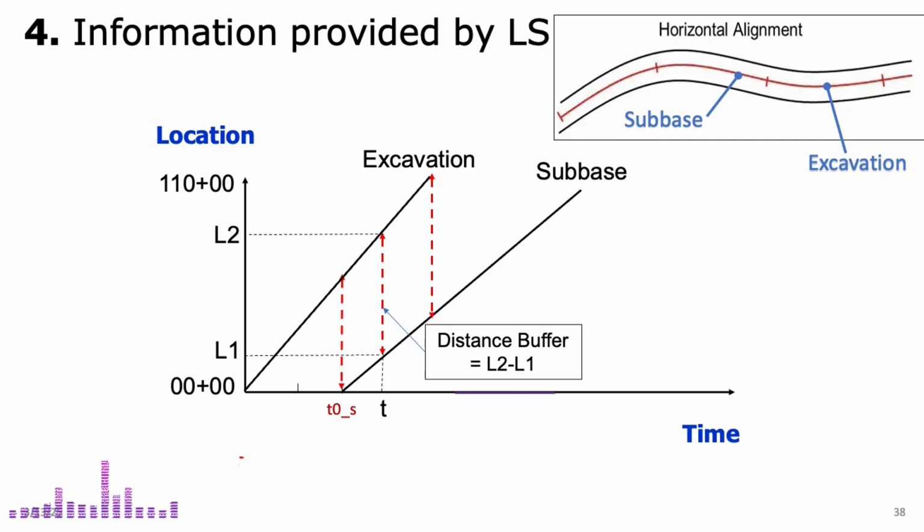In this case, we have two activities, excavation and subbase, both beginning at Station 0 and ending at Station 110. However, excavation starts first at an earlier time, while the subbase work begins later. This delay may be due to technical or space constraints.